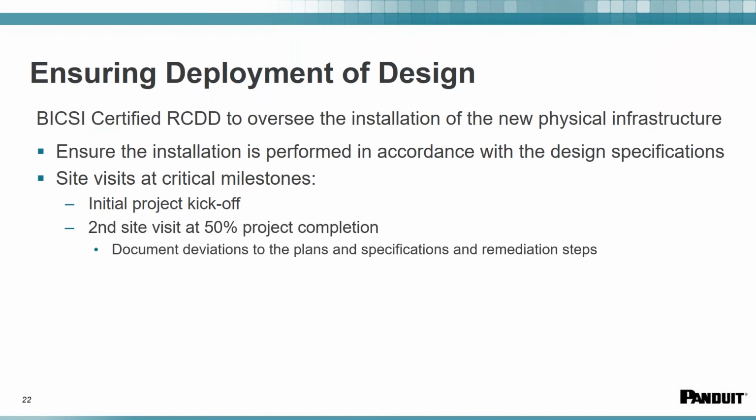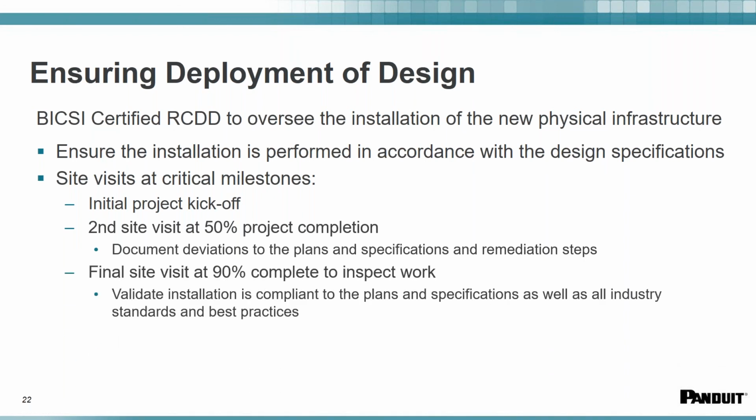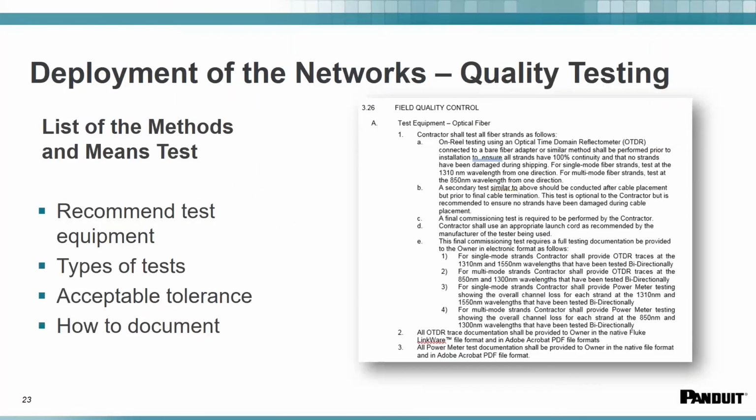So now it takes us to the notion of how you can make sure that a certain design is implemented correctly. And this is where you have to design in what we call the quality testing system. You have to define what would be the recommended losses that are acceptable to my system, how long, what type of testing guidelines I need, what type of testing reports I require.